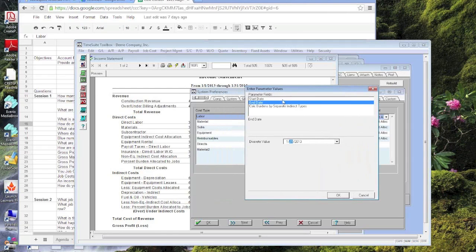The one thing that the estimating process sometimes has to allow for is that there are no transactions that hit the accounting process. So the only way to get those costs out of the indirect cost section and onto the projects is to burden them onto the project in some reasonable manner. They can be burdened on labor, direct labor dollars. They can be burdened on a unit basis. But generally, people are trying to keep it simple.